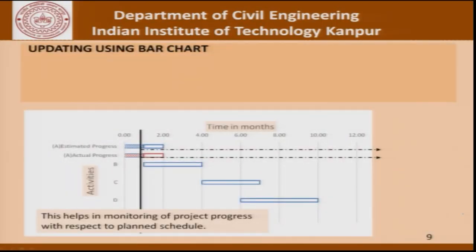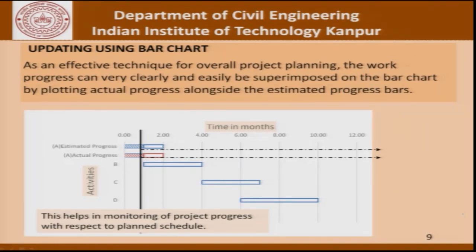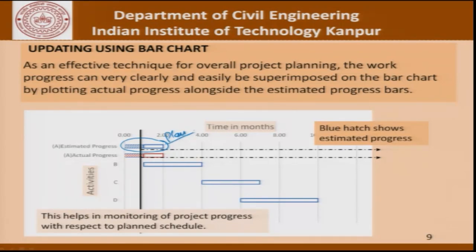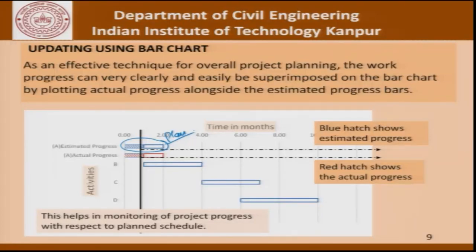To show what we are trying to say — how to use a bar chart for updating — the blue hatch shows the estimated progress, which is our plan. Compared to that, the red hatch shows the actual progress. This is a very effective technique for overall project planning. The work progress can be very easily and clearly superimposed on the bar chart by plotting actual progress alongside the estimated progress bars. This is a graphical and easy-to-understand method, as we will see in illustrative examples.